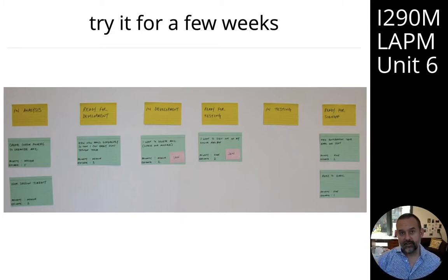So from your second planning meeting onwards, after you've completed estimation, you will look at the velocity from your last iteration, and that will set a limit to the amount of work that you plan for the next iteration. This technique is called yesterday's weather, and it's a capacity planning technique. Our velocity from one iteration determines our capacity for the next iteration so that we don't try and take on too much work.